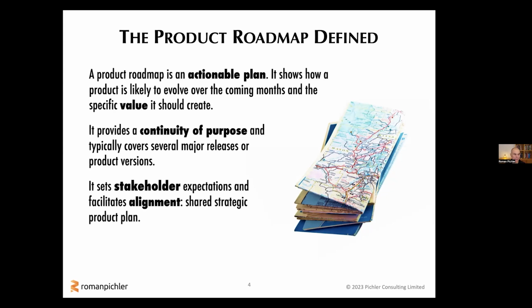And second, I find that product roadmaps are a great stakeholder alignment, engagement, and management tool, and they're much better suited, in my experience, to help the stakeholders understand where we want to take our products compared to the product backlog, which often contains just a little bit too much detail, and it's too changeable, too volatile. So as I say, generally speaking, I would recommend that you consider using a product roadmap for your product.